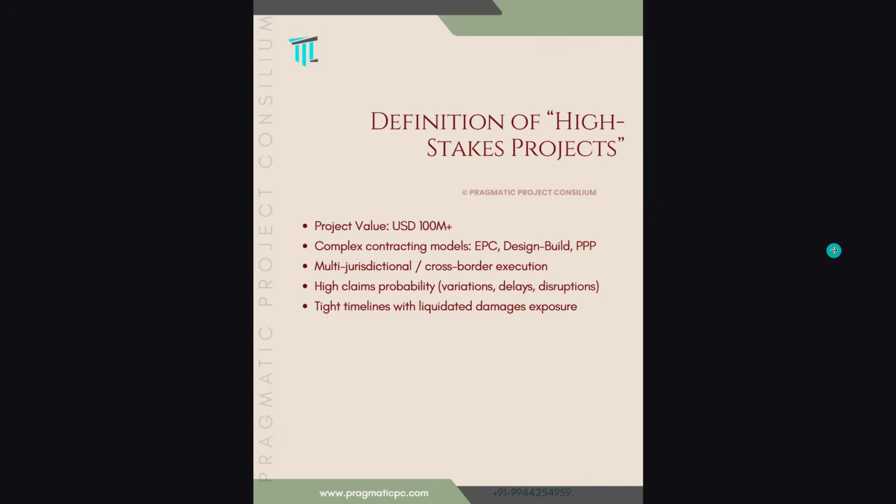When you are not clear with your design or your scope, it ends up in variations, delays, and disruptions. Then there are tight timelines. When you are going for landmark projects, the timelines are non-negotiable. Even if the budget is very high, you can play with the budget, but the timelines are non-negotiable. In such cases, the LD exposures will be very high. Beyond the LD, it affects reputations and public interests. That is where it has to be taken seriously as a high stake project.